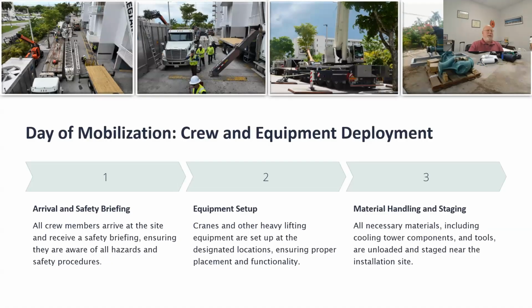Now for what I would, again, like I said, game day. Typically the time that we shut the cooling tower down, take it off the roof and put it up, that process actually usually is very fast. Rarely have I seen that process take more than a week. Usually, at most, a day or two of lifting the equipment off and putting it back on. And quite frankly, a lot of times, we want to focus on one single day to get the equipment off and back.